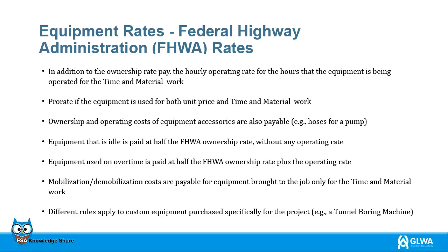If the equipment is not being used, then it is paid out at half the FHWA ownership rate, without any operating rate. If the equipment is being used on overtime, then it is paid at half the FHWA ownership rate, plus the operating rate. Mobilization/demobilization costs are payable for equipment brought to the job, only for the time and material work.